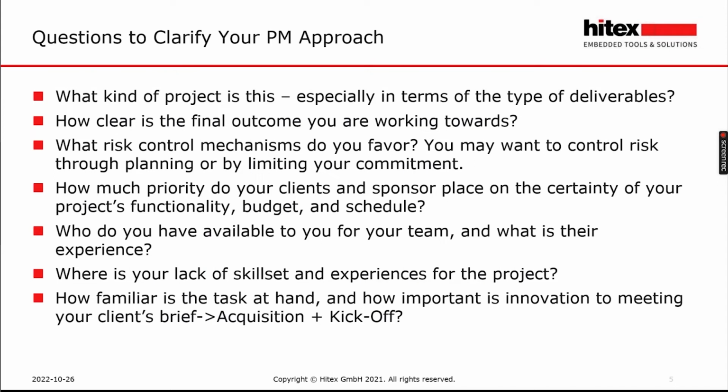So in any case, I kindly advise you to prepare the acquisition phase of the project and discuss every task, every module development in your project during the acquisition phase. And of course, prepare yourself and your team for the kickoff with your client. During the kickoff meeting, you can introduce yourself, introduce your team, show the main project milestones, the project timeline, the project budget, and of course, you can ask about some tricky topics in the tasks. Sometimes clients see a little bit of a different picture of the project than the one you have shown. So during kickoff, you can find out what the client really wants from you. So it's really very important to hold a kickoff meeting. Please think about it in advance.